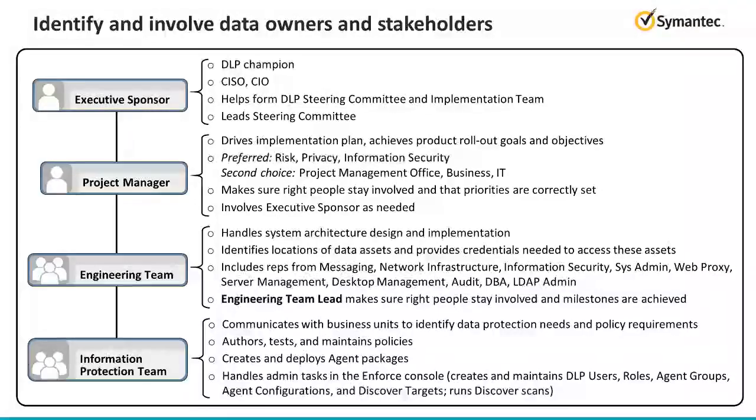The first step to identifying where data exists in your organization is determining who owns the data and has an interest in protecting it. An effective approach to this task is to build a Symantec DLP implementation planning task force that is composed of key stakeholders across the organization, from an executive-level sponsor down to the staff that manages the organization's databases, network files, document repositories, mail servers, and MTAs, etc. A strong dedicated project manager is critical.